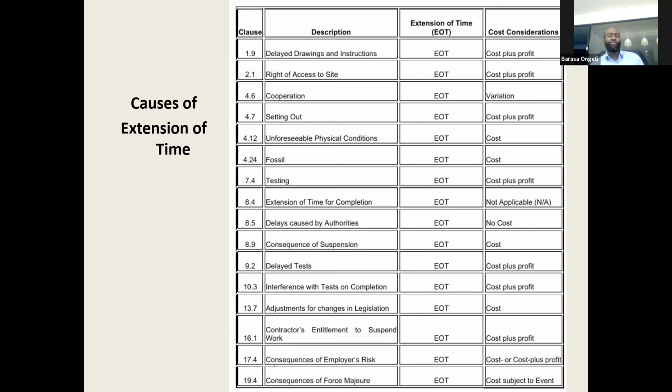So you're expected to cooperate with a contractor carrying out fiber works, fiber internet. And so you're told pause between kilometer 1.1 and kilometer 1.6. Pause your construction because we have another contractor doing fiber works in that section. You'll stop for a couple of days and it will impact your program and you'll be entitled to an extension of time. Remember, I'm using the word entitled. I'll get to it in a short while. Then you have all the other conditions. I'll not go through all of them.